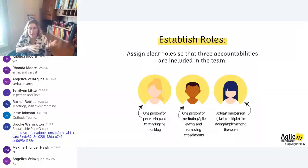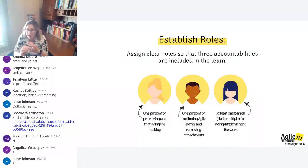So I see some of you have said, nope, not sure. Some of you have someone that you think is in that role. But the reason that role is important is that it takes away some of the do-all-the-things pressure, and instead says, team, this is what's most important. And yeah, there's more behind it. There's always going to be more behind it. Here's what's second most important. Teams that focus on one thing, let's do this, are going to finish whatever their list of all the things is. The case studies say they're going to finish those faster if they focus on the priority first versus scattering their attention across everything. So that's why that role is important.